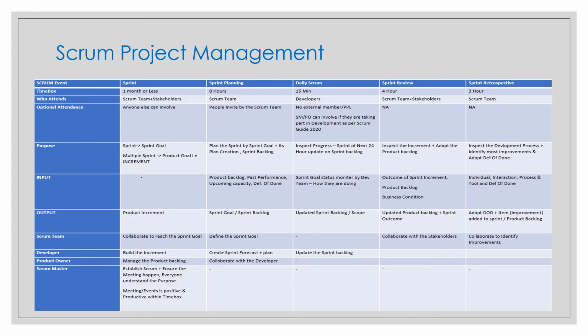So when the immediate sprint is about to start, before that your product owner will divide your epic into user stories. Then when the refinement happens, the entire team will work on epics, user stories, tasks, subtasks, user story IDs, their estimation, sizing, and acceptance criteria. We use the Atlassian Jira software tool, or you use the Microsoft Azure DevOps tool for this agile planning and the portfolio or capacity management as a Scrum Master.